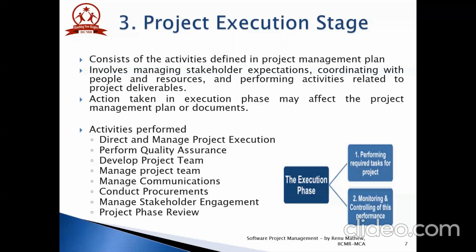The three main inputs to acquire project team are roles and responsibilities, project organization chart, and staffing management plan. While there are three outputs: project staff assignments, resource calendars, and project management plan updates.